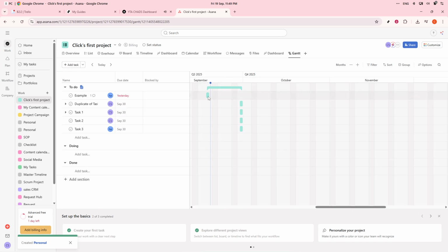Finally, track your project's progress closely. Use milestones, which are represented by diamond icons, to earmark key deadlines. It's easy to identify overlaps or potential delays simply by scanning your chart. Keep an eye on your task dependencies, as any holdups in one task can pose risks to others that are linked, helping you to proactively manage any issues before they escalate.